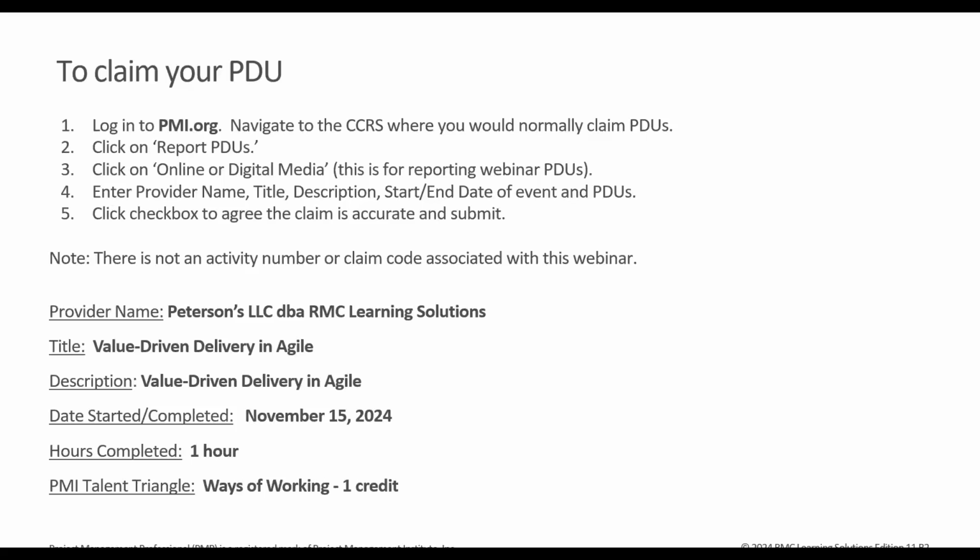Continuous non-ending delivery process comparing to. So, Radek, if you're still here, Agile looks like a continuous non-ending delivery process compared to traditional with a beginning and an end. Okay, right. And then you asked how long should an Agile project be, from my experience? Okay, so the definition of a project itself has a definitive beginning and a definitive end. So not at all. We have to close out an Agile project just like we have to close out a predictive or plan-driven project. So I don't mean to intimate that in this discussion that we're having today.